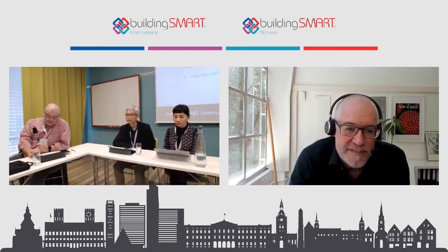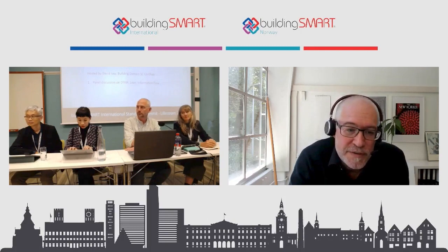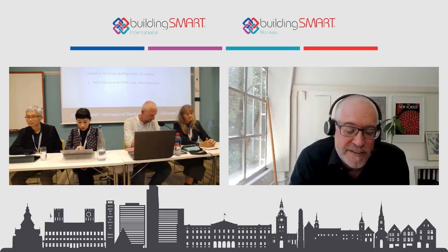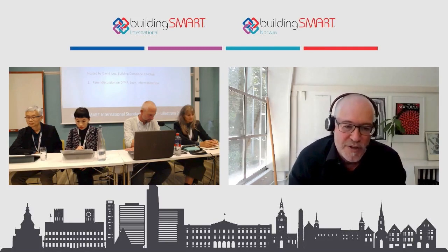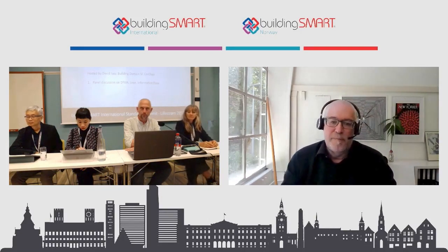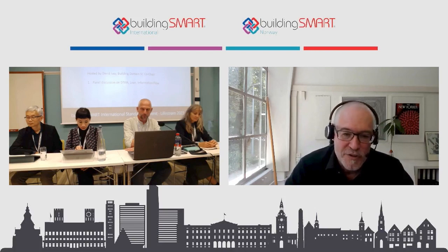The big upside of prefabrication is that you can parallelize things if you manage to plan them properly and have some proper lean management on the project. Things can happen in parallel and basically meet on site just in time. But that would mean that you have to have a pretty good idea about what you're doing, how long things take, and you need the right partners to get everything just in time on site. And the other thing is, if you manage to collect that data, it's also pretty straightforward to find out how much carbon you spend on transportation or other things. So I think both in terms of making things quicker and shorter, and knowing what's actually happening, that would be a nice idea. And of course, digital models are part of it.